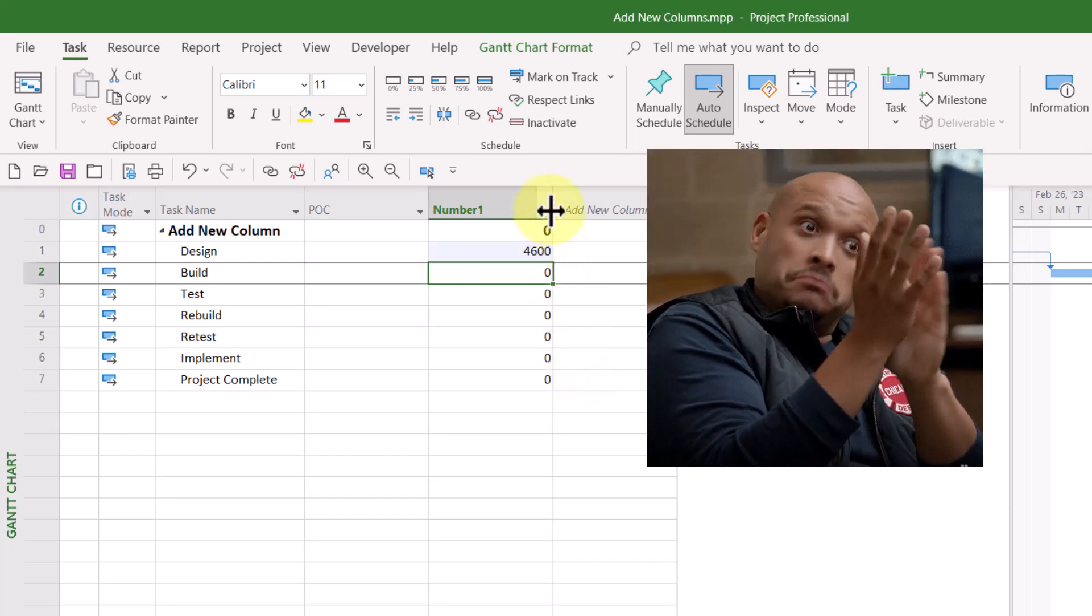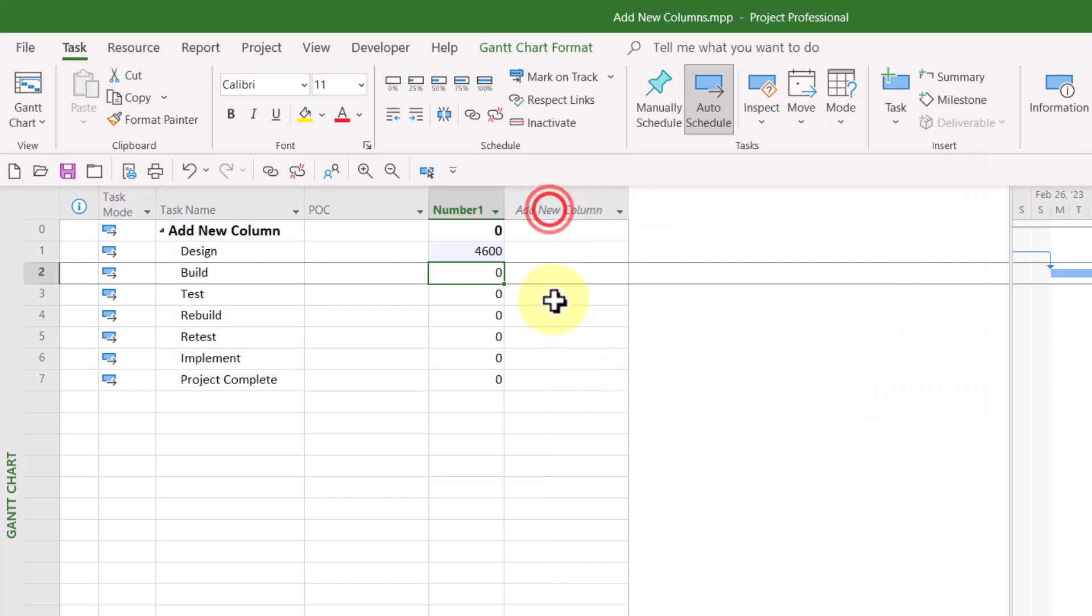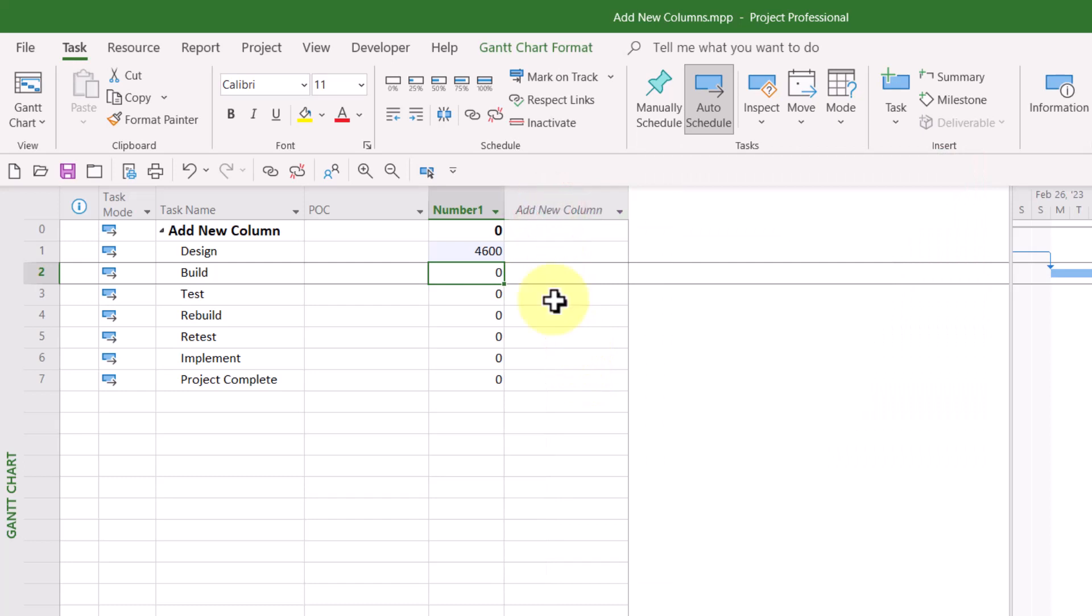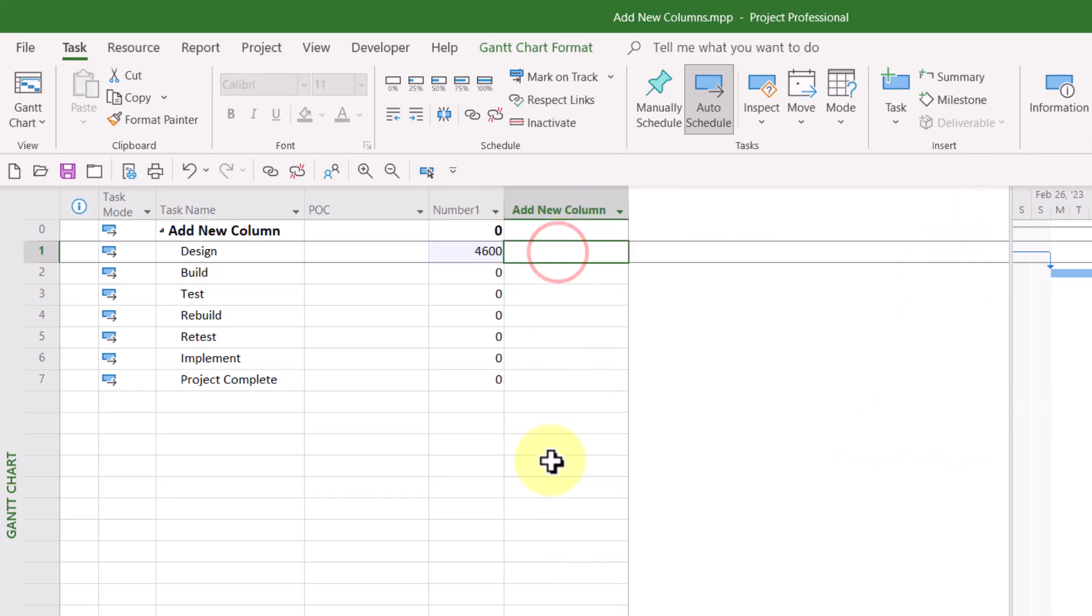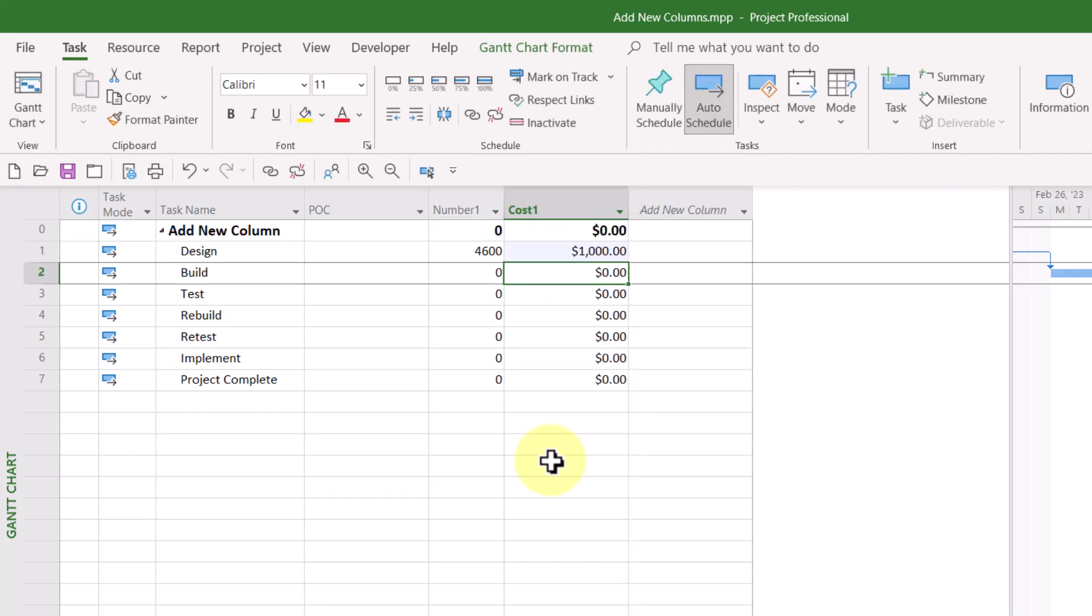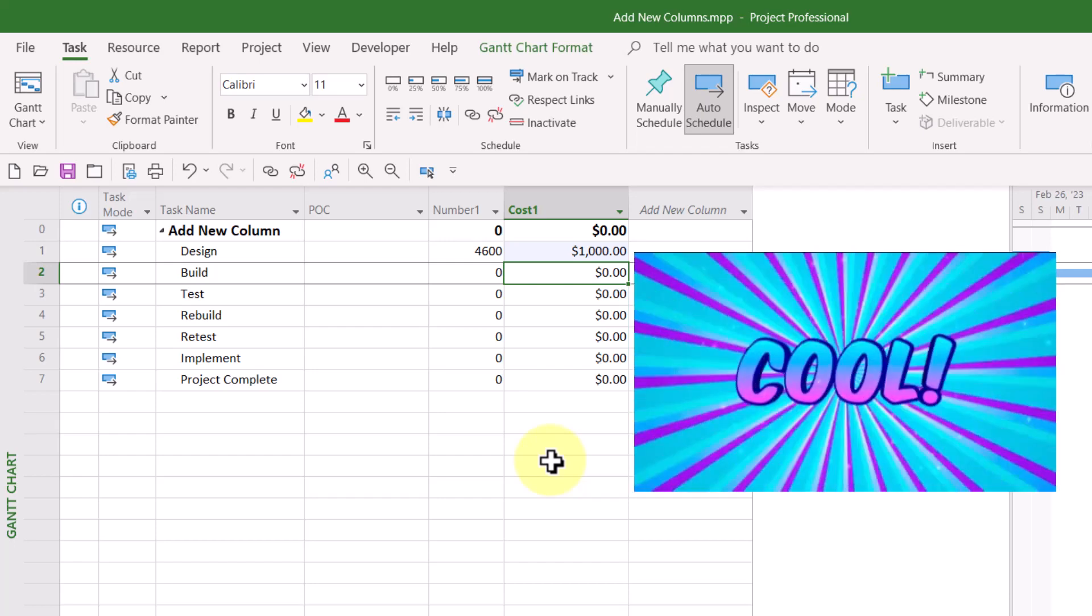And if you type $1,000 for a task in the Add New Column Virtual Column, Microsoft Project will insert the first available cost field. In my case, that would be the cost one field.